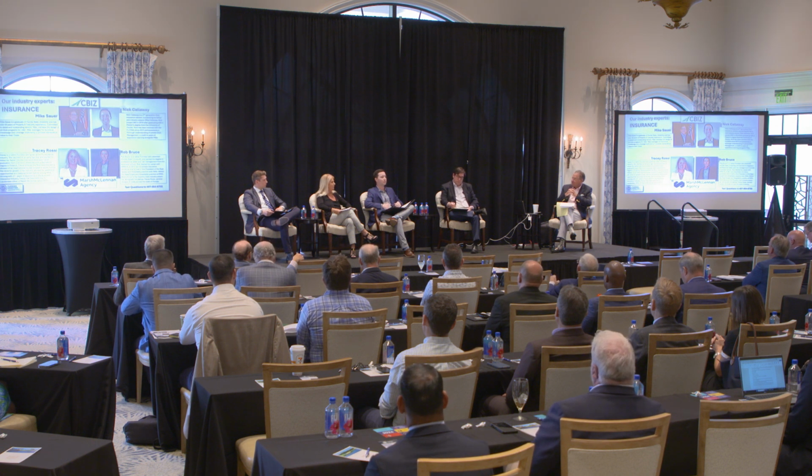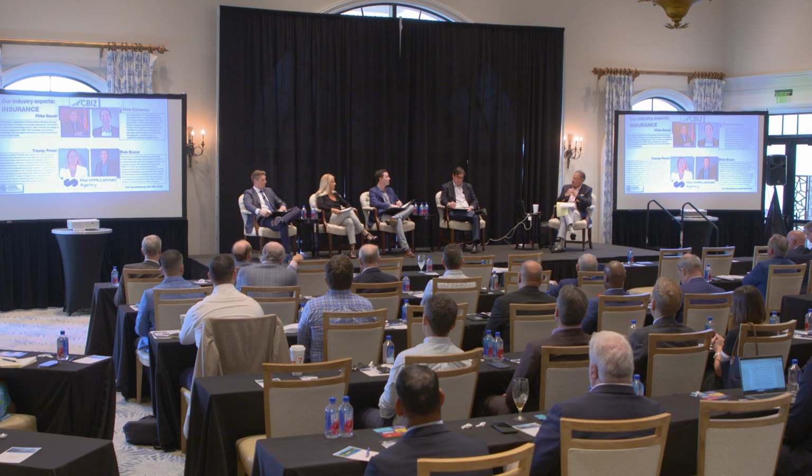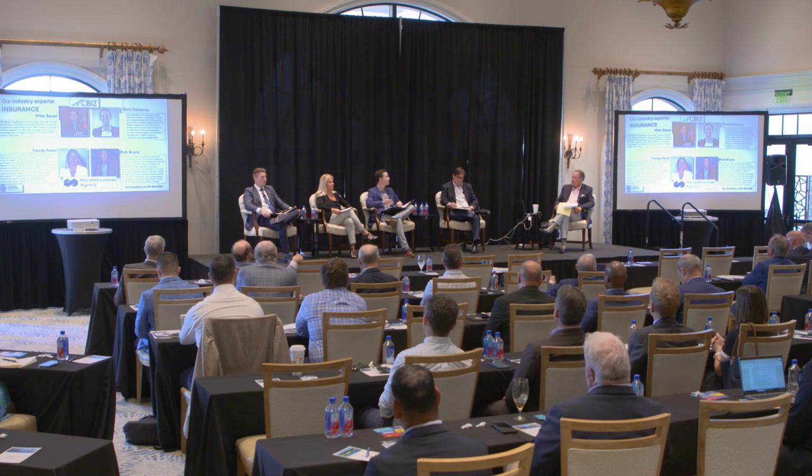And Nick, I think both of those points really highlight the value of communication. Because if a club was going to do a driving range renovation and also wanted to build a golf learning center, instead of doing those in two consecutive summers, do it in one year and you could have it fully insured. Versus if you did the course renovation separately, you wouldn't be able to place the coverage. And then for Tracy's example, you could consider the timeline of when you're doing the project. We have a club now that started their renovation during season, much to the chagrin of the membership, but all of the real construction work will be done before July. So there's less risk of damage while they're doing construction or delays from weather.